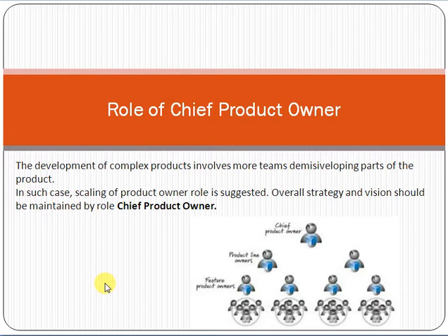However, in the Scrum framework we have a concept of a sprint. A sprint is a 3 to 4 week time period in which we take the first 10 tasks and plan, develop, test, and deploy them in sprint 1. Sprint 1 will have the first 10 tasks, then sprint 2 will have the next 10 tasks, sprint 3 the next 10 tasks, and sprint 4 the last 10 tasks, so that we reach 40 tasks and the whole project is complete.